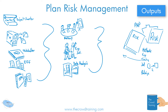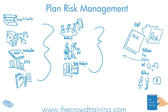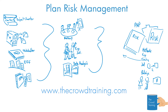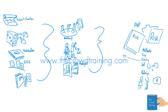Again, it's how we plan to manage the risks of the project. It's not necessarily identifying the risks — it's asking: how should we go about identifying the risks? How often? Who should do it? How should we categorize it? How should we talk about it? What roles and responsibilities exist? Maybe there's a reporting structure that needs to be understood, funding indications about how costs are applied to handle risks, and how much tolerance we're willing to take. So that's a quick review of the inputs, outputs, tools, and techniques of Plan Risk Management.